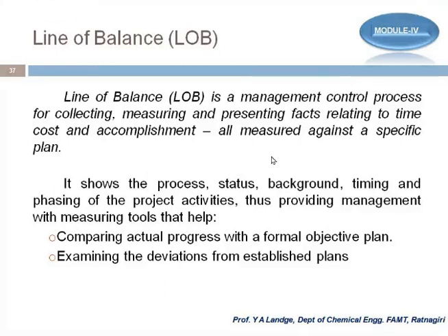But if you follow up on that activity after 1 week, knowing that 4 weeks are needed and at least 20 to 25% should be completed within the first week, and only 5% is completed, it means I need to pay more attention and exercise more control on these activities so that they are completed in time. If I divide this 4-week activity into 25% to 30% per week and take the follow-up, then definitely we can control it.